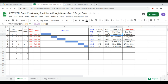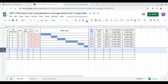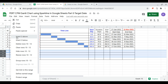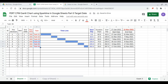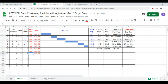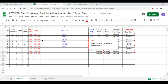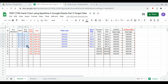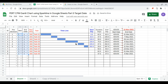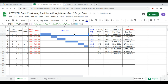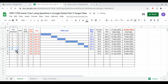I'd like to add three more tasks: this will be 400 man-hours, 500, and 300. Man-hours default to one man per shift and one shift per day, so we drag this downwards. Task 7 follows task 6, task 8 follows task 7, and task 9 follows task 8.